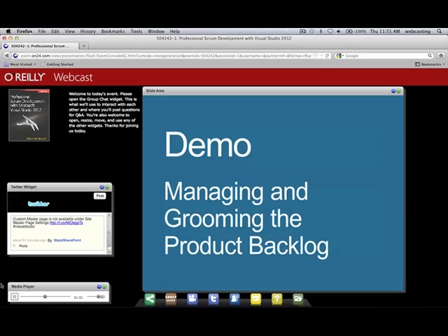Another way I've seen teams do this is if there's an upcoming product backlog item that requires some new capability that somebody doesn't have, like I've got to go off and learn Windows RT development for this new feature coming up. Well, then that small PBI, which maybe was a story point of 5, just became a 13 because there's a lot of learning in there that's got to be done. And honestly, given your team's velocity of 15, that's the only thing you're going to be able to do that sprint. So you take that, you spend a lot of front-loaded learning on it, and then the next few WinRT kinds of development tasks, backlog items coming up later, will get smaller because you've already invested in that learning.